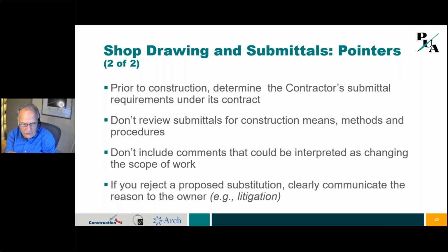Okay, and prior to construction, determine the contractor's submittal requirements under the contract. So you've got contractually required obligations that the contractor has to give submittals by certain dates. And stay on top of that. Don't let them get behind. Don't review submittals that are for construction means, methods, and procedures. Don't include comments that might be interpreted as changing the scope of the work.